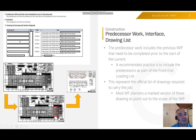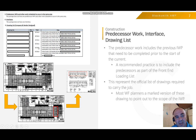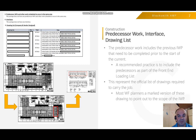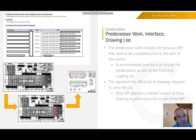Another important part is knowing the predecessor work. The IWP typically has just one small statement on whether it has predecessor work or not, but this approach misses many activities — especially for underground work. For instance, if there is any excavation, it is often not mentioned as a predecessor, which has caused delays in installation work packages. This is why we decided to add predecessor activities to our front-end loading checklist.